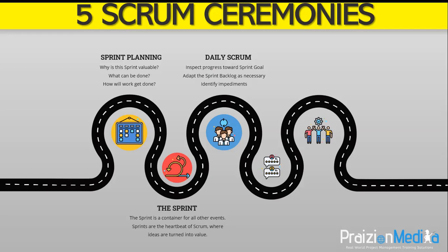Now, you do remember that daily scrums could be run in two ways. The first way is the three questions. What did you do yesterday? What do you plan to do today? What are the impediments that stand in your way, if any? But you could also choose to walk the board and start from the right-hand side, those items that are close to getting done, and asking the question, how do we move this to done? Daily scrums improve communication, identify impediments, promote quick decision-making, and consequently eliminate the need for other meetings.